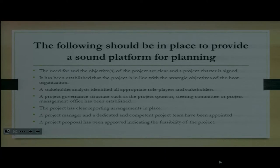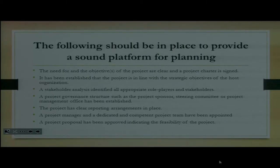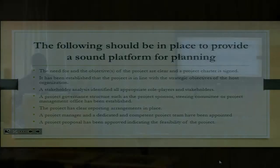Before you can start planning a project, it's very important that you have a sound platform for planning in place. Number one: the need for and objectives of the project are clear and a project charter is signed. A project charter is a document that has the objectives and why you embark on the particular project, and the stakeholders are supposed to sign to confirm they understand what the project is all about.